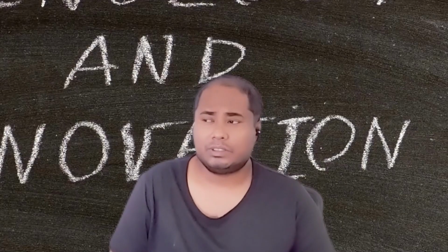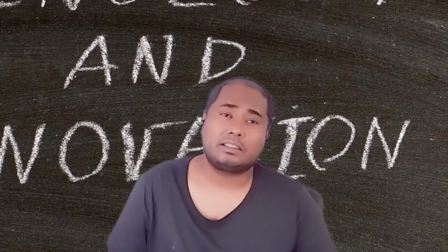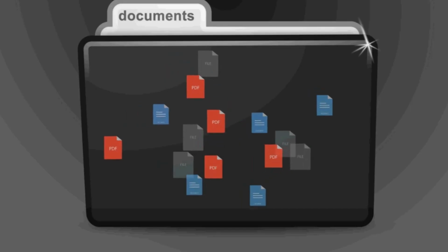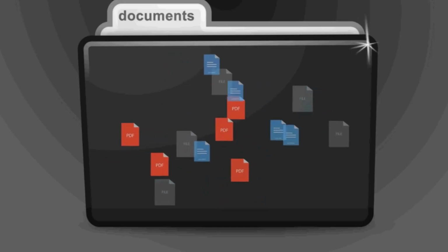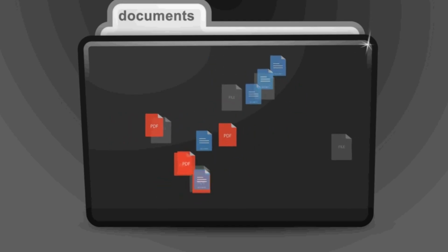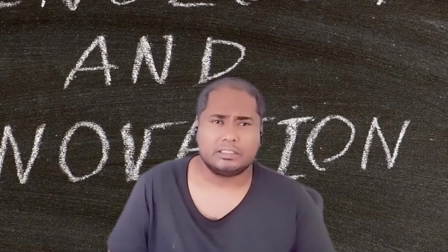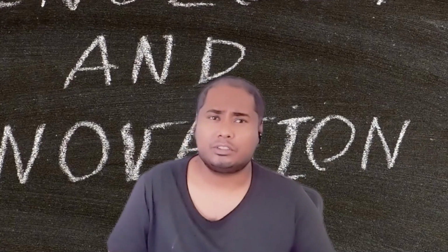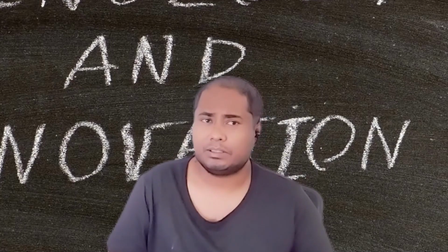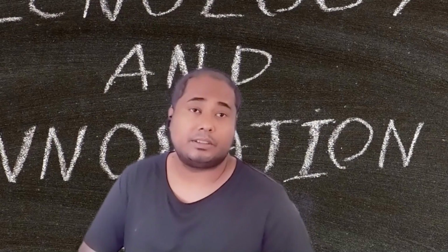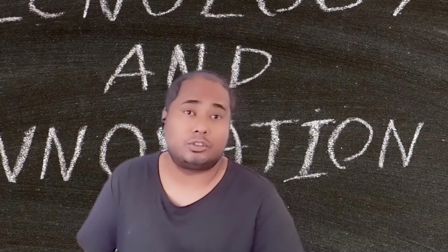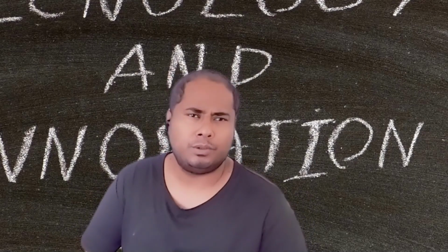One more thing I should discuss is that the method statement is prepared after the risk assessment. So both documents must match when filling in the method statement. Some key points we are going to discuss. Now I have a format, and I will show you one by one how to fill in a method statement.